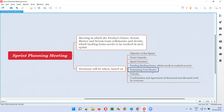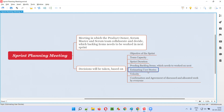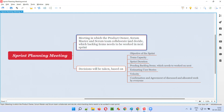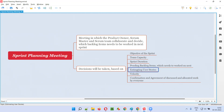For example, if someone asks the estimated distance from your location to a friend's home or to a bus stand, you approximately say it is around three or 3.5 kilometers on average. Similarly, these user stories which need to be worked on next also need to be estimated at a high level using story points. Before attending the sprint planning meeting, the product owner, scrum master, and scrum team need to come up with story estimates on the proposed stories. They can then discuss these estimates in the meeting - whether everyone is on the same page regarding them.